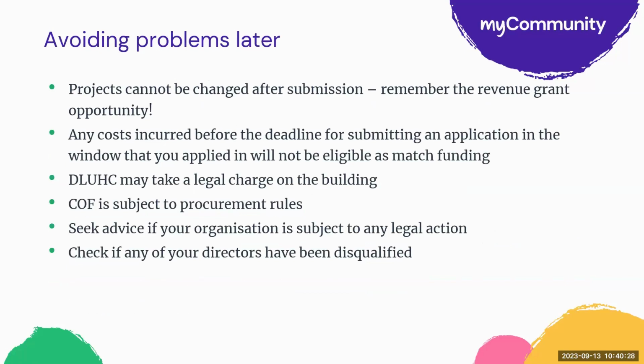When you spend match is also really important as well. The prospectus states that you can't spend the match before that COF application window closes in the window that you're applying for, because that match is then not eligible if you do that. The safest way is to wait until your application is successful and you talk to DLUC about permissioning to spend that match. Some projects have fallen through on that: they've spent their match, they haven't been successful, and then when they reapply, that match is no longer eligible again.